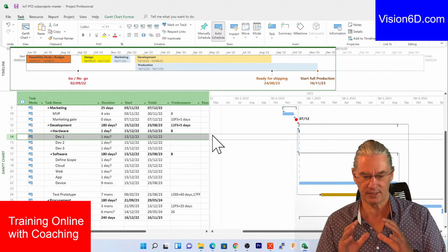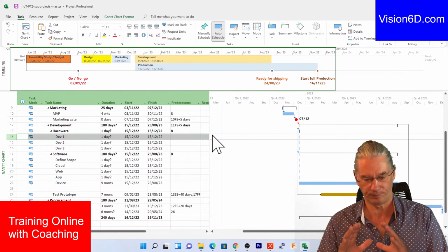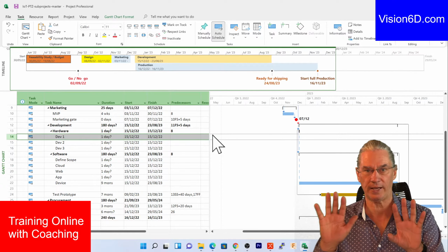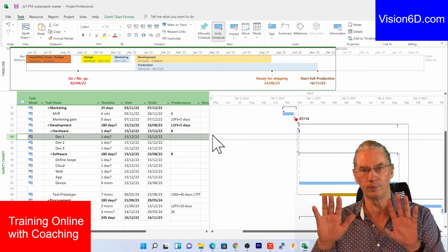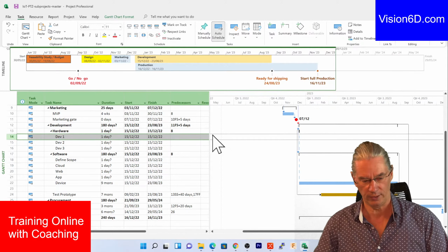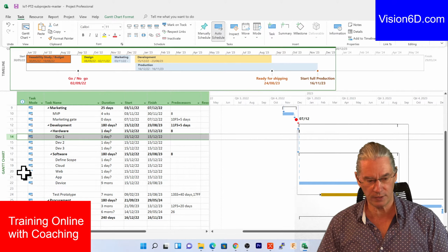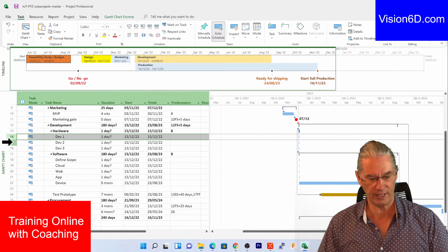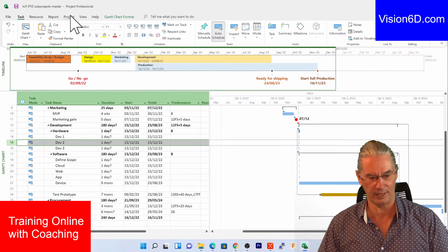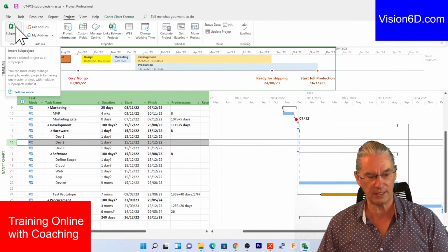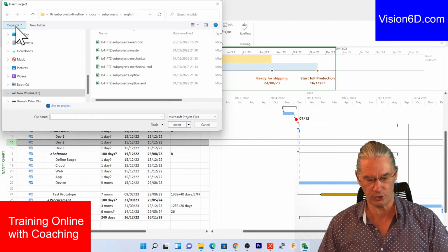first of all, let's make sure we understand that this is one file, and what I just showed you is a second file. So what I'm going to do is to integrate the second file into the first one. And you are going to see that this is really simple, and I want to have this under the name device 1. So for that, I select the next line, and I come up here into project, and here you see that I can define sub-projects.